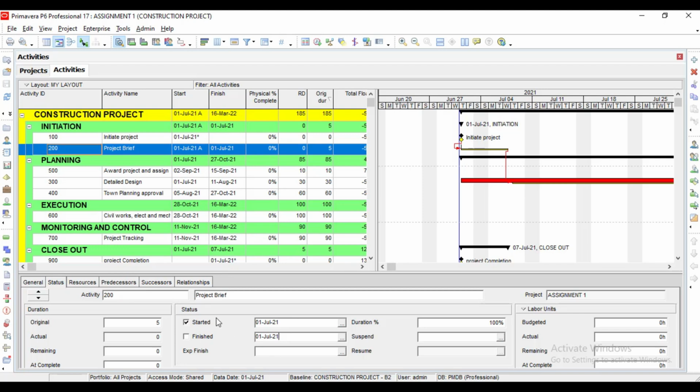So basically what it does is when you update your project and you schedule, it automatically rearranges the dates for you as you are updating your project. It automatically rearranges everything for you. So that is why it's very important at any particular point in time, as activities are going on in the course of your project, you are updating them every day. Usually somebody will be responsible for updates, and immediately they do the update, they make sure they click the schedule so that the program can take that information into consideration, and it can rearrange those activities to suit the project as it were.